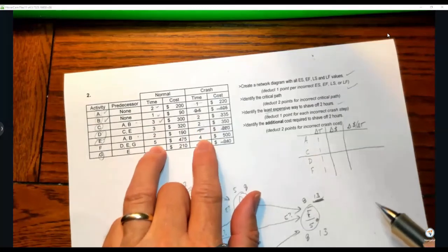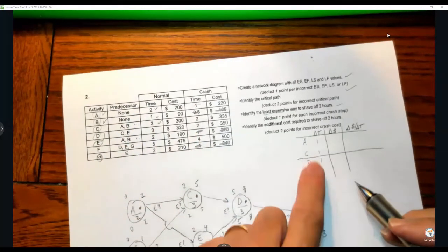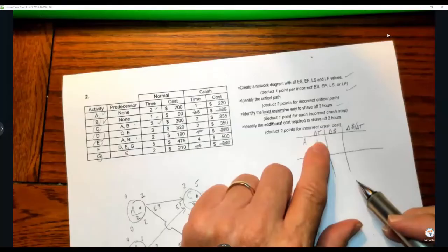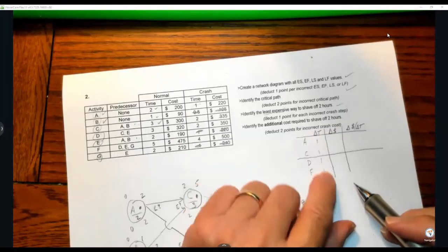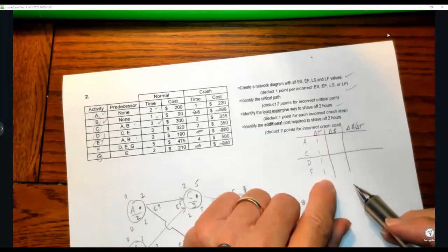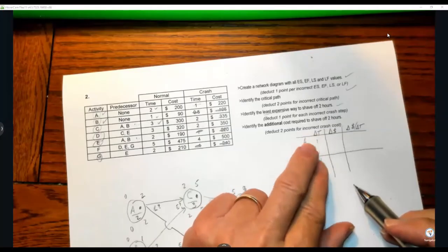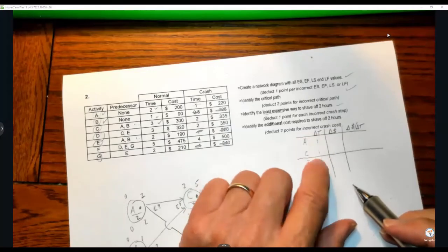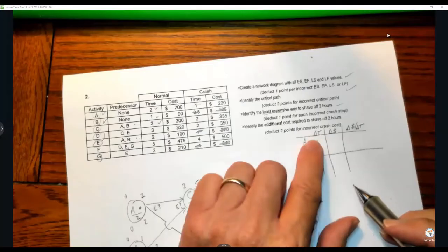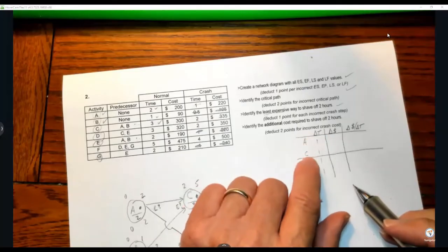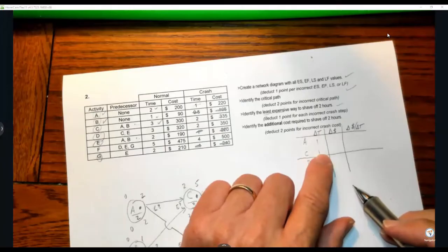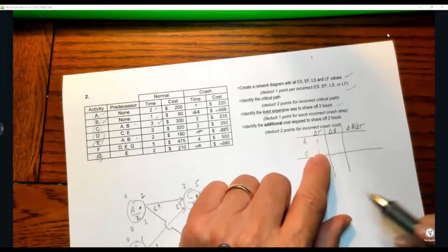This tells me right away that I can save an hour, and that's the most I can save on any of these operations, which tells me that I'm going to need to pull from 2 things to save 2 hours. No matter what I pick, I'm only going to be able to shave off 1 hour if I choose just one, because that's all there is available. It's like you've used it up, and now you have to go find other sources.